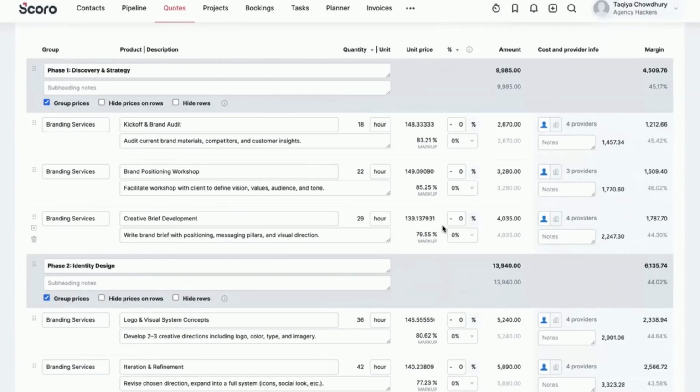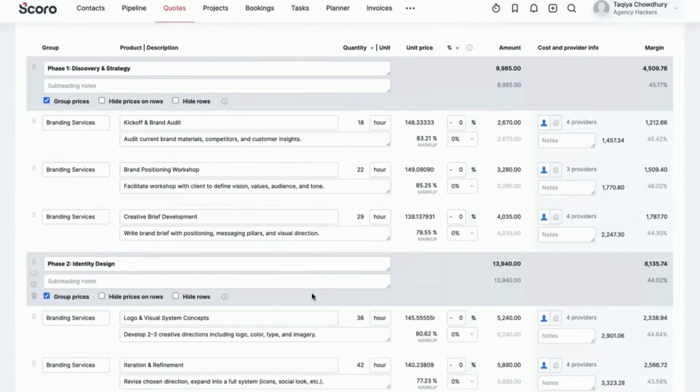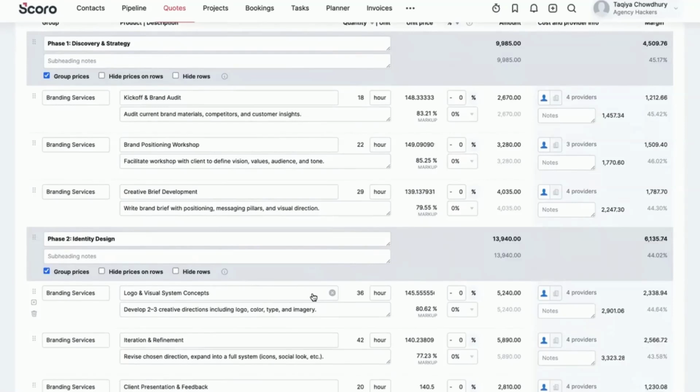But what's going to end up happening is that with these different line items in place, you will then be able to see what the charge out is supposed to be for each of them. How do you come up with that charge out rate? It depends on how your business runs. If you have a more service-based model where the deliverable dictates the charge out rate, that's pretty simple. It's maybe 40 hours of work, 200 a rate, it'll give you a final price.